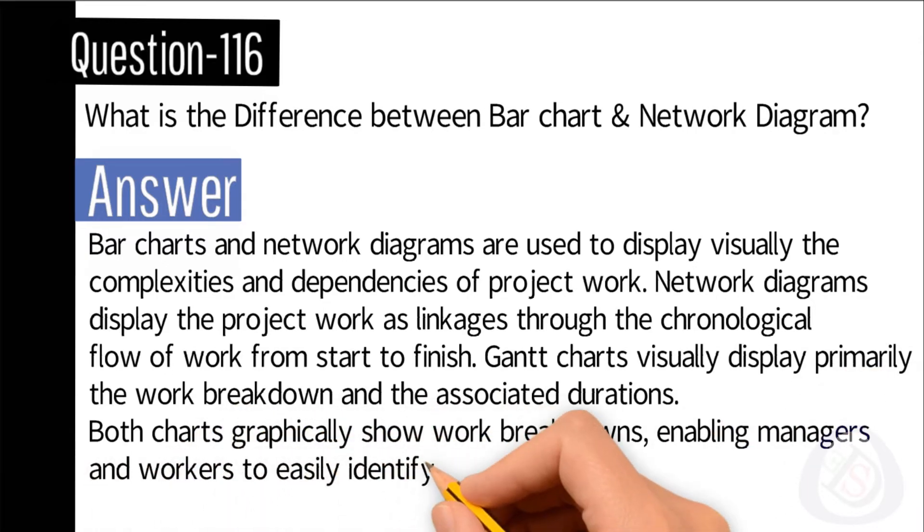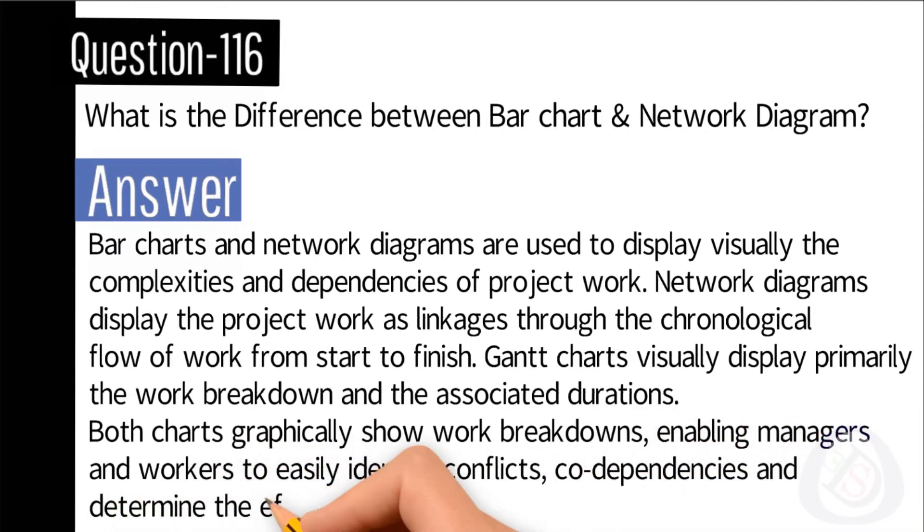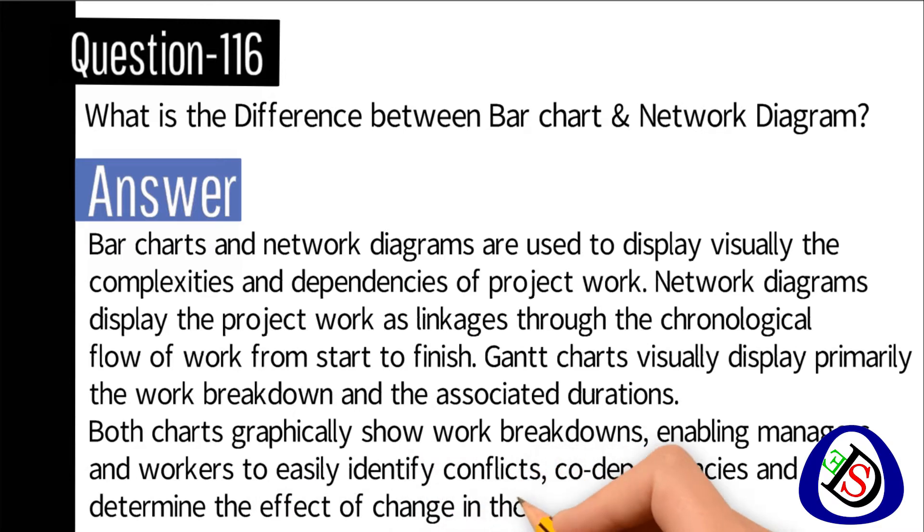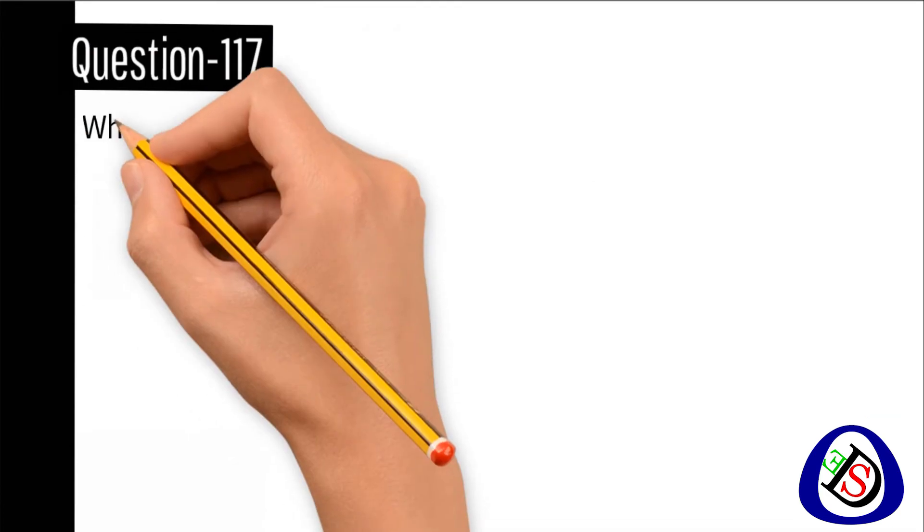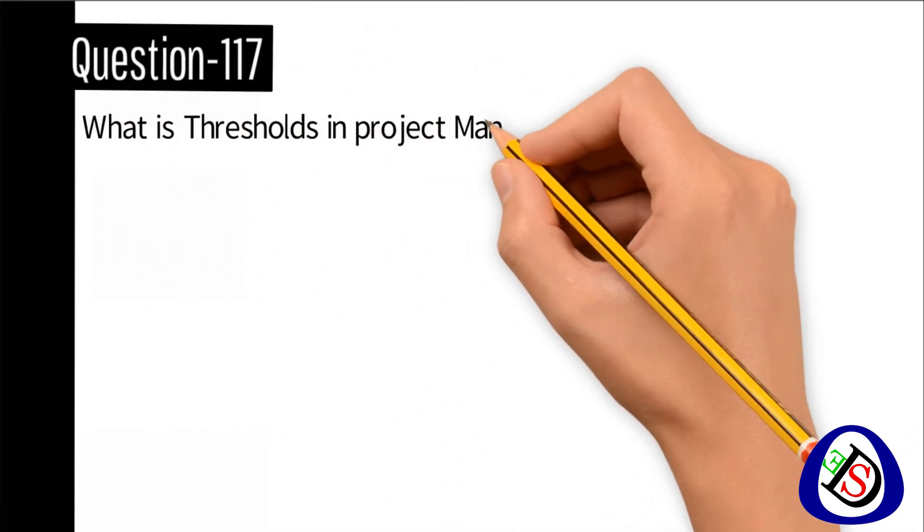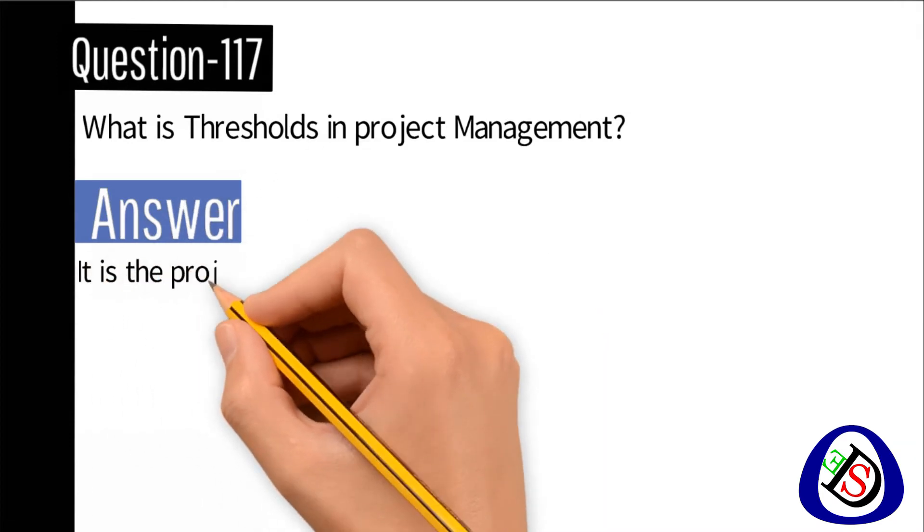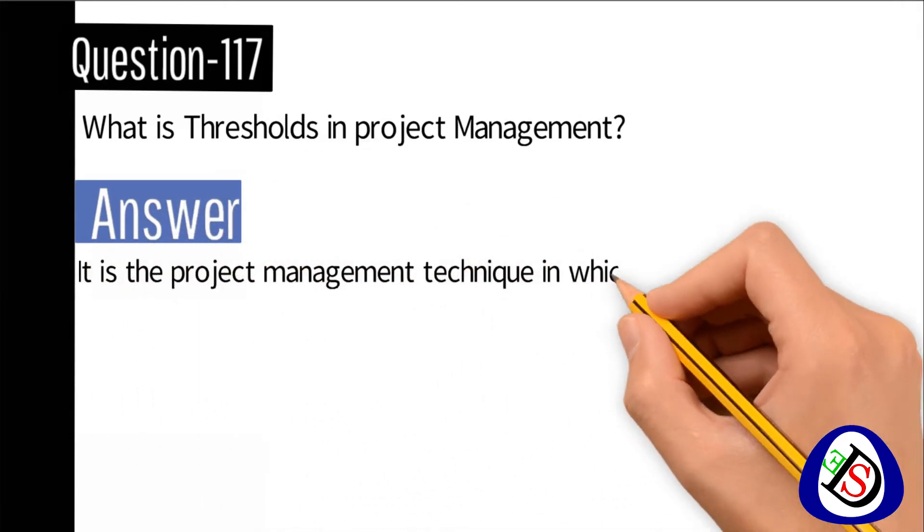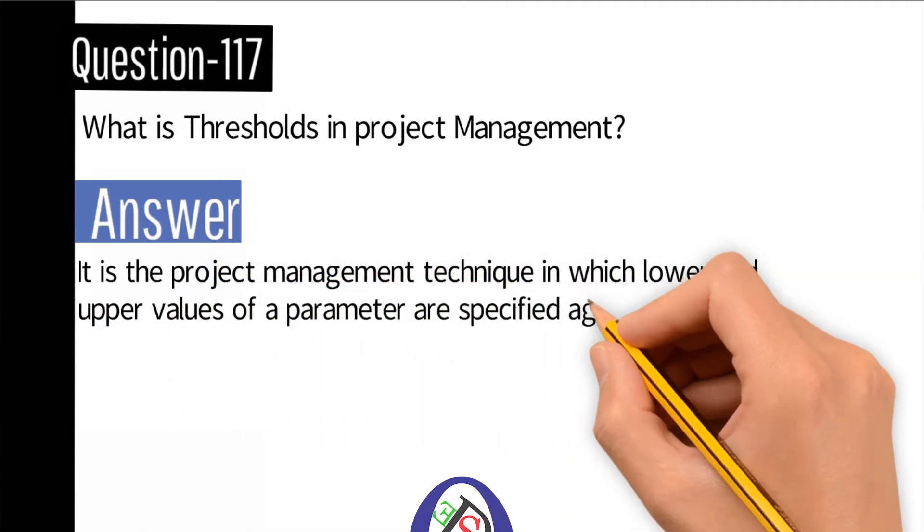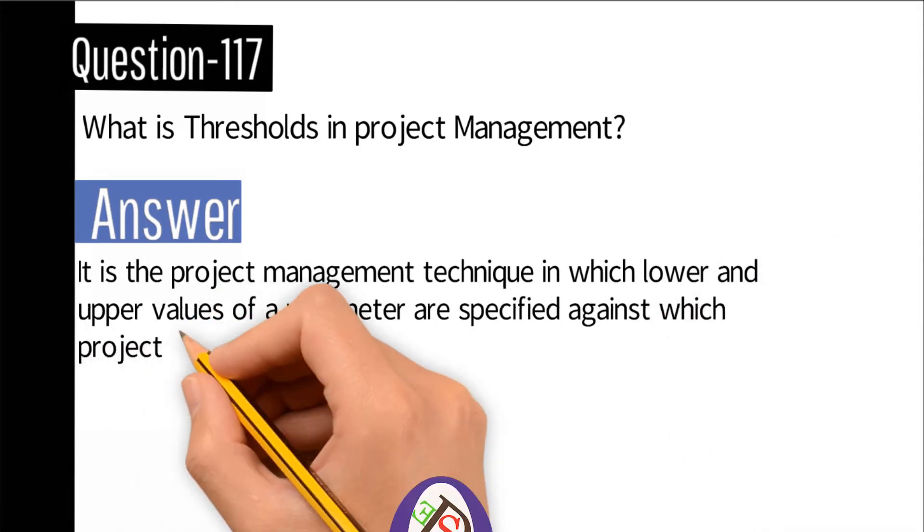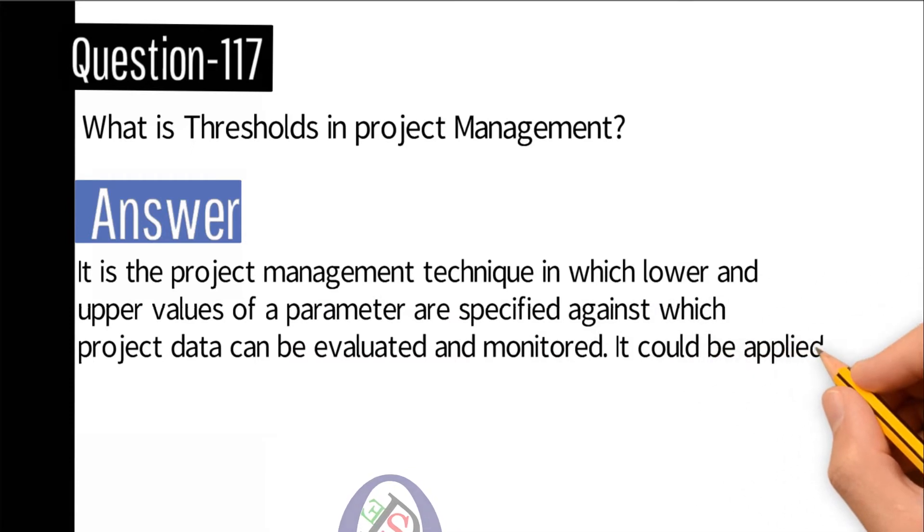Question number 117: What is thresholds in project management? Answer: It is the project management technique in which lower and upper values of a parameter are specified against which project data can be evaluated and monitored. It could be applied on WBS level as well as activity level.